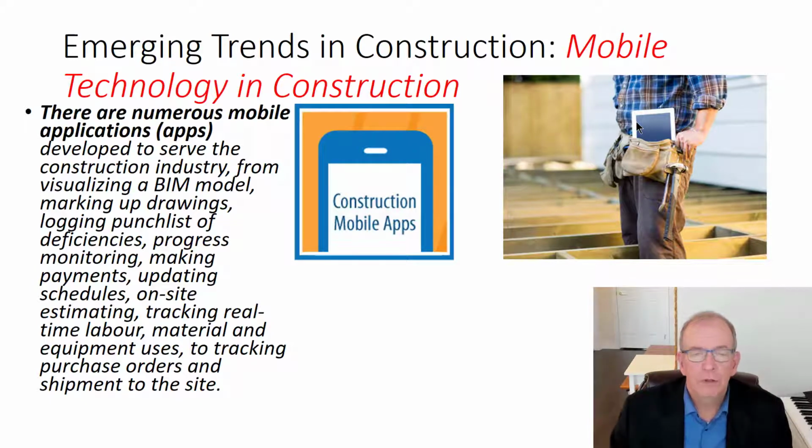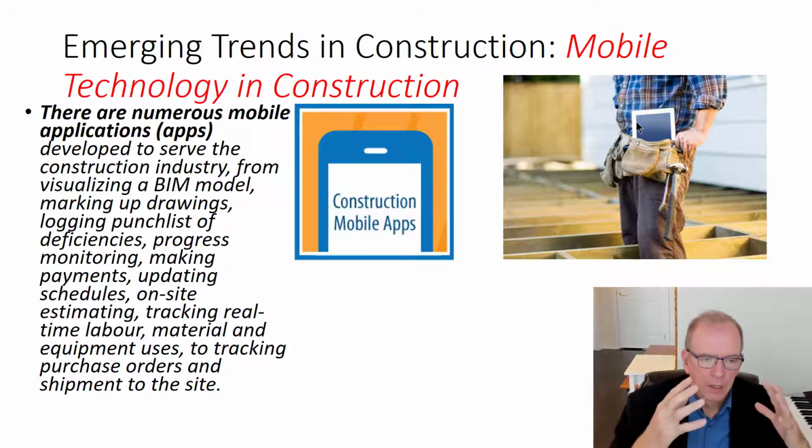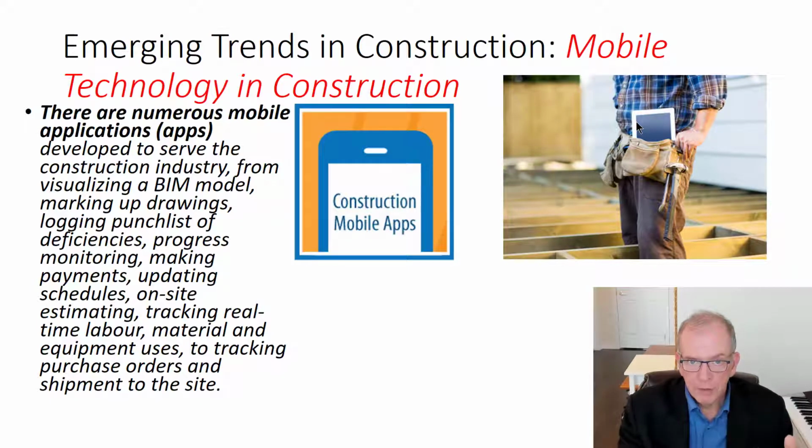You would not believe how helpful that is in the construction industry, because there are so many mistakes made by looking at something that was the current document a month ago, but something changed since then. So you have subcontractors working off something that's a month old, and they get so far down the path. What are you doing? You've got to redo it. Millions and millions and millions of dollars can be saved by having a system in place that ensures you have a dynamic system and not a static system.